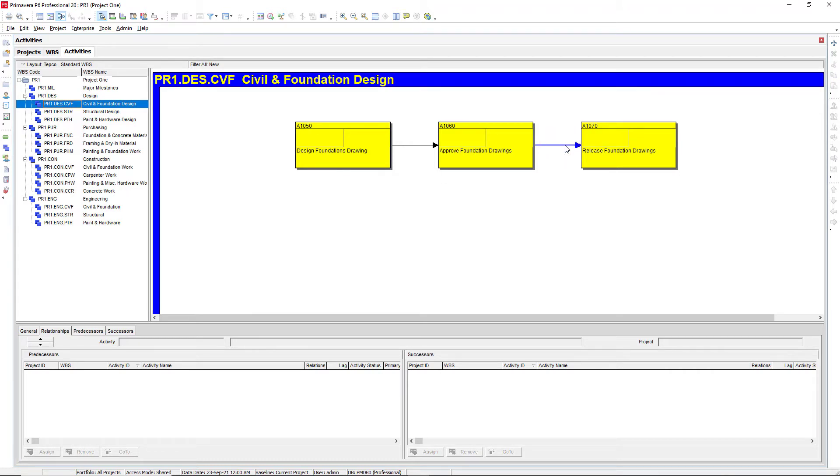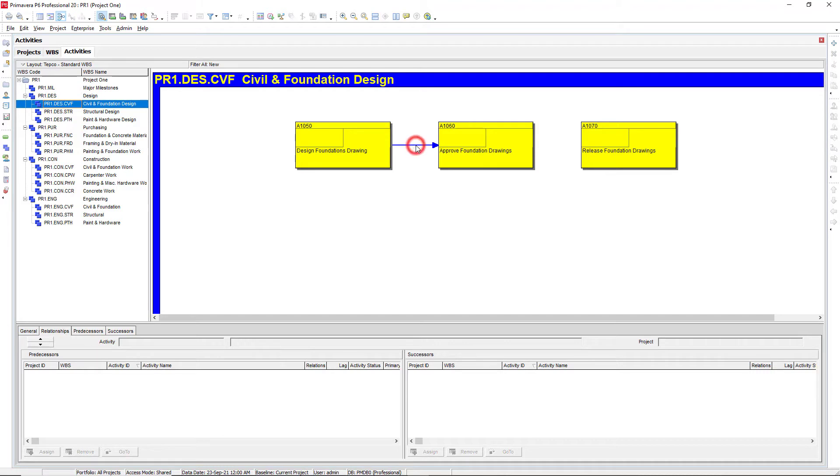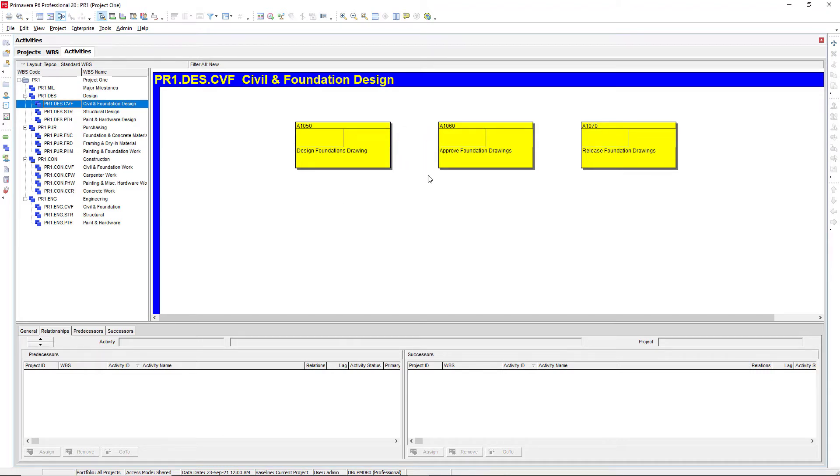So we can do the same thing that we saw before, we can select that arrow, press delete on the keyboard, and then select yes. Select the arrow, delete, and then yes.